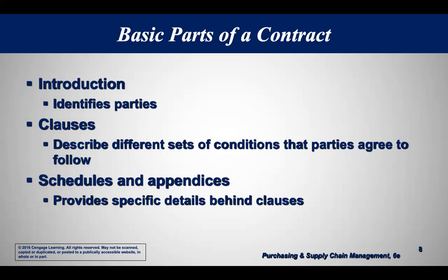Sometimes you might want to put the delivery schedule at the back, call it Schedule 1, and it'll be the delivery schedule. The next schedule might be the destination points. It's just a lot of facts and information that'll be referred to in the main part of the contract. So the contract itself can just say, delivery shall be done according to the schedule described in attachment A. And so the main contract doesn't have to change. You can just change attachment A.